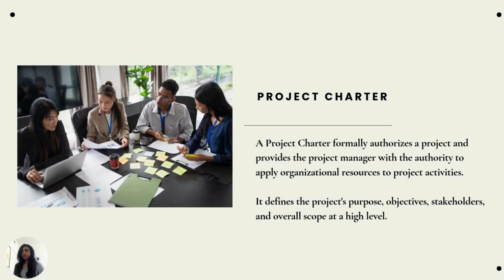Project charter. Project charter is the first document which is needed for any project right after the business case has been created. Who creates it? It's created by the sponsor and not by the project manager, because the project manager has not been assigned, or the project manager has not started the work on the project. So let's go through what is project charter.